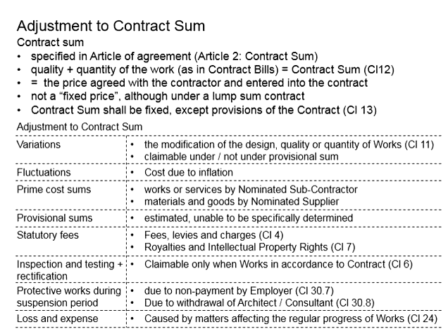However, this is provided that the work is in accordance with the contract. In the case that the inspections and the testing done found that the work is not in accordance with the contract, now the relevant costs will have to be fully paid by the contractor, and no adjustment to the contract sum is allowed.